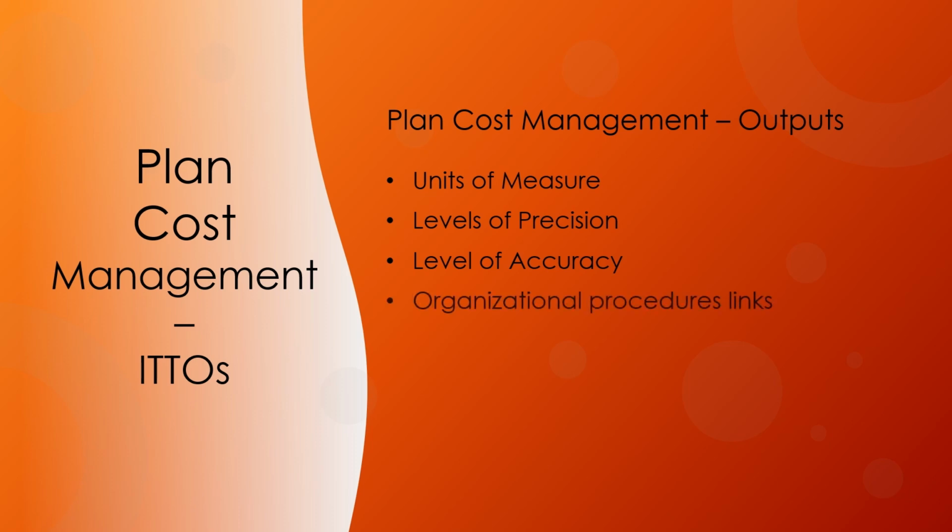The organizational procedures link describes how cost management activities will be integrated with other project management processes and procedures. The work breakdown structure, WBS, provides the framework for the cost management plan, allowing for consistency with the estimates, budgets, and control of costs.